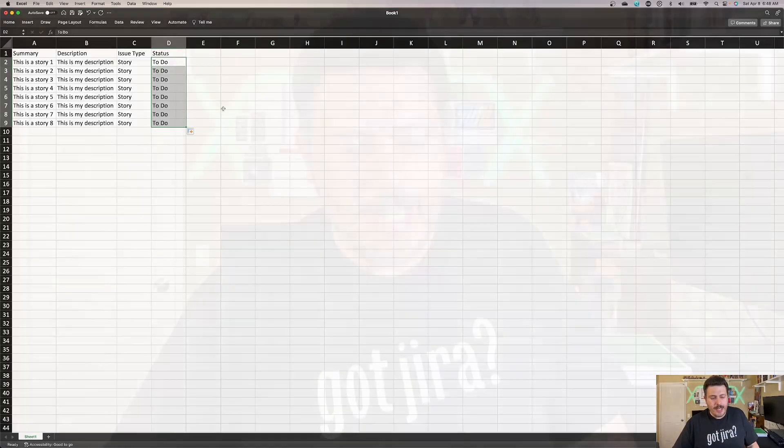You don't have to bring in the status — if you don't, it will just default to the very first status in your workflow. But if you want to automatically put some issues to 'In Progress' or some as 'Done,' then you'll want to include it. Any field in Jira can be used here, but I want to caution you: dates are very tricky to import, assignees are very tricky, and linking is very tricky. So I'm going to do three separate videos covering each of those three scenarios.